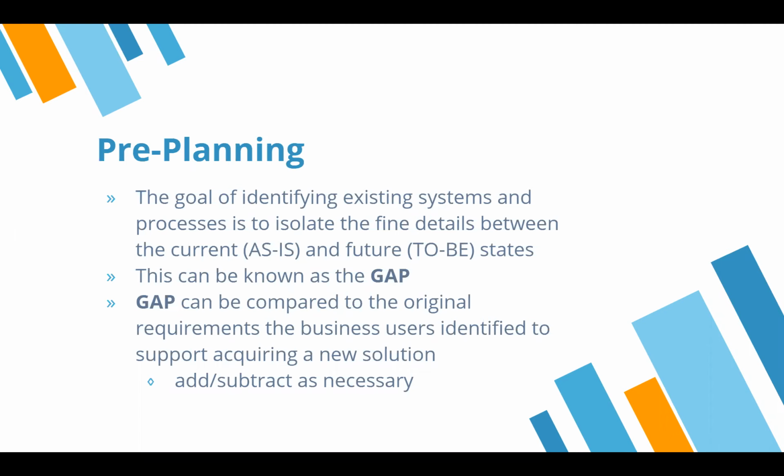So again, this becomes an interesting exercise with your business side of the house, either if the business is doing it or the IT side of the house is doing it with the business. Oftentimes they're asked to compromise. One of the best ways to present it, however, is in a strategy that often works well in many of our implementations, is that we do try to encourage our clients to target a base system. Starting with a base system gives you the opportunity to learn the system, understand how the system works, and adapt to the change.